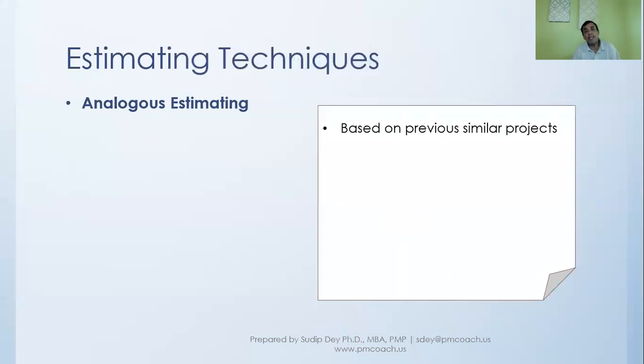We have built another house, or our company has built another house before. Of course, not exactly the same, slightly different. So we look at the estimate of that particular house and use that to estimate the house that we'll be building. From there, we'll see how much time it would take for the full house, and how much time each piece will take, so we go top down.